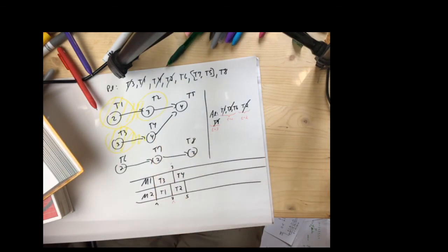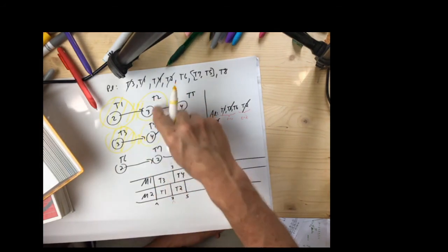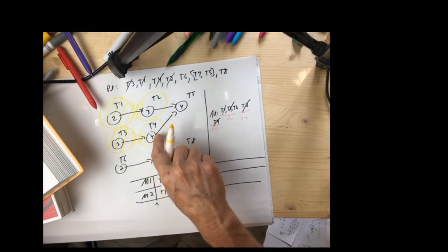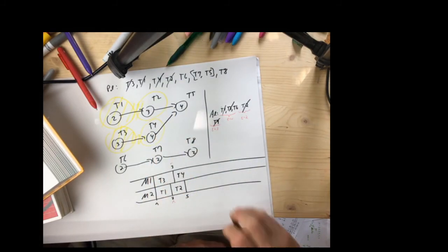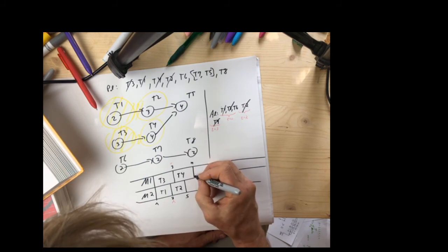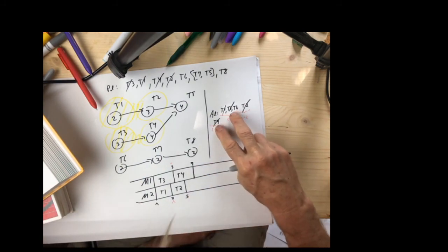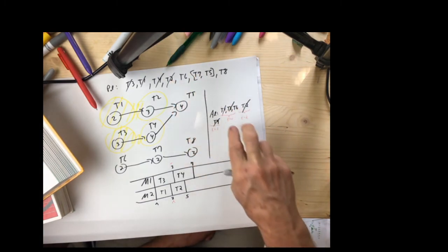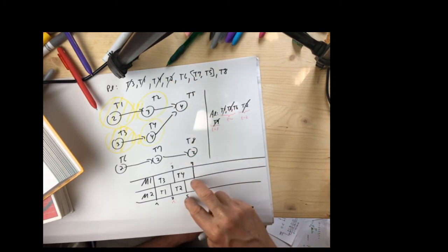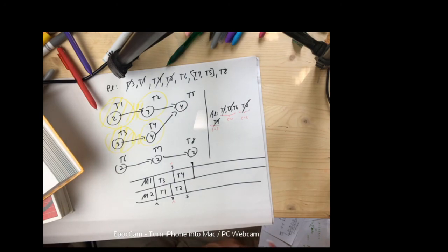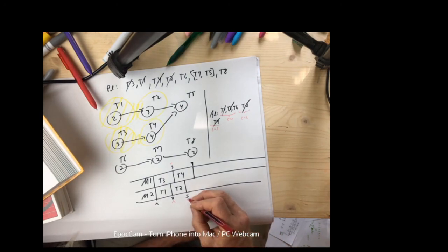Now, T4 just got assigned. 2 jobs are running. When does T4 end? 4 hours later. That's out till 7. I've updated my available list. I've updated my priority list. I've updated my diagram. I have my end of time markers in. I move time forward now to time equals 5.